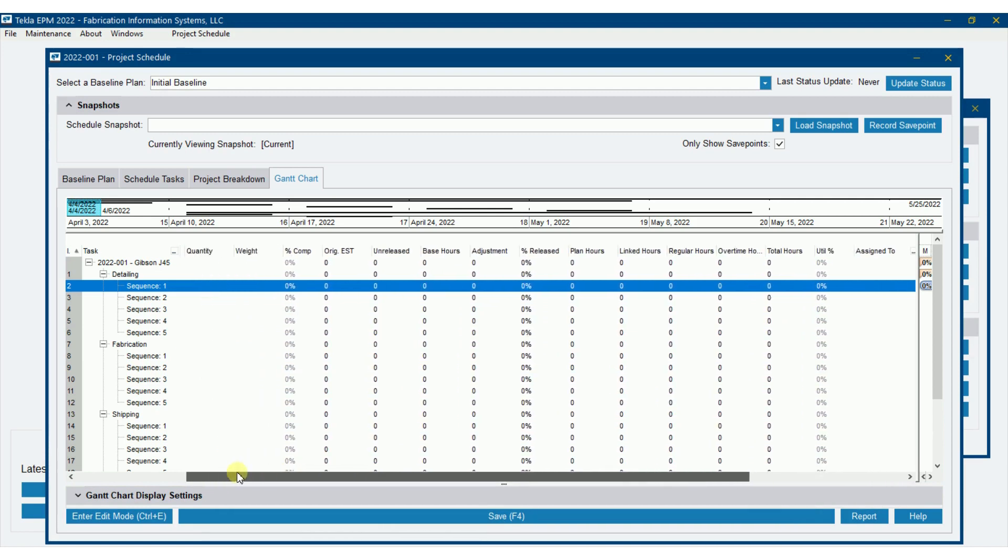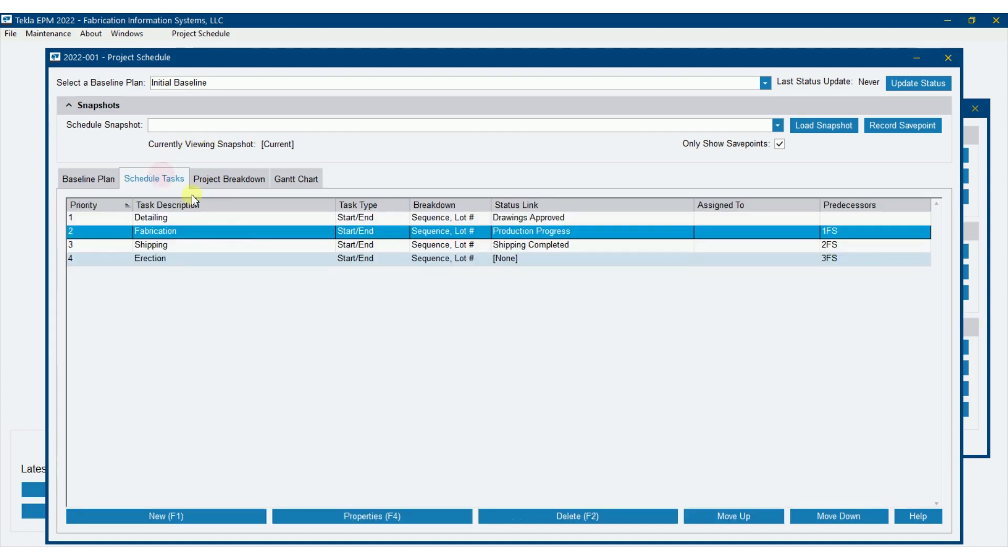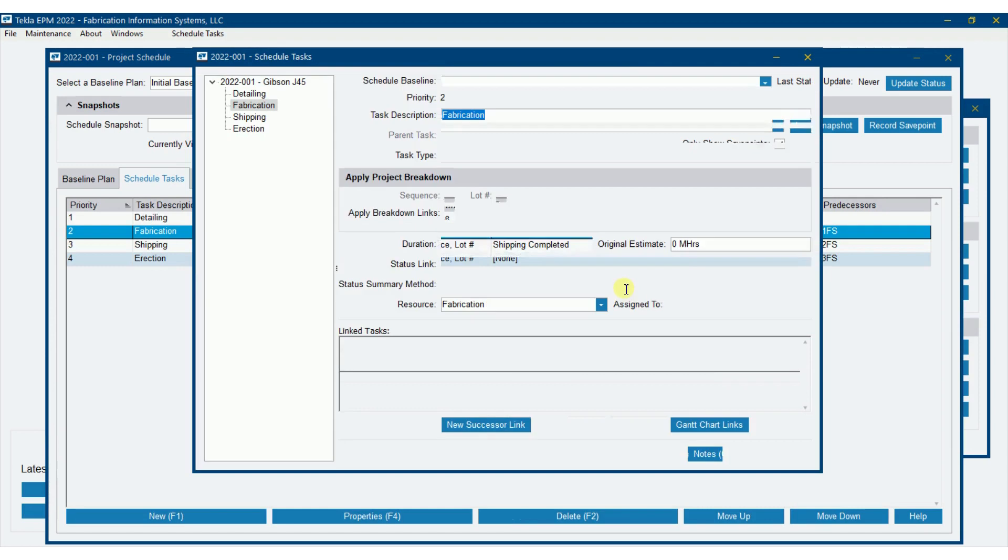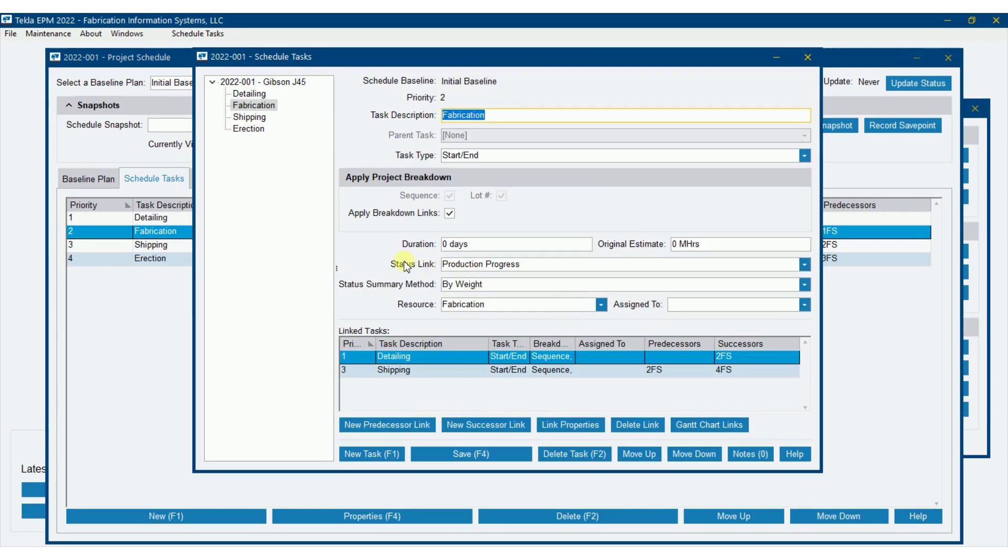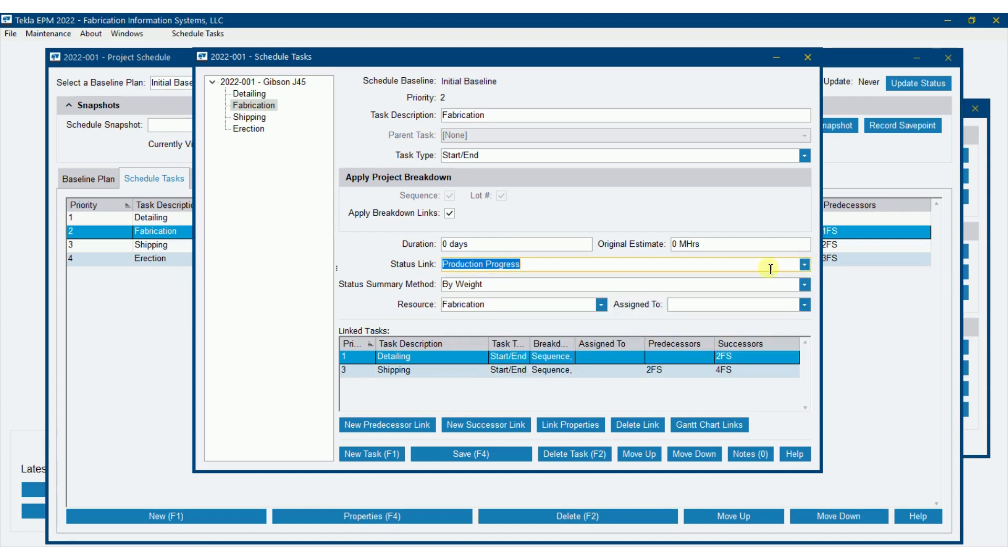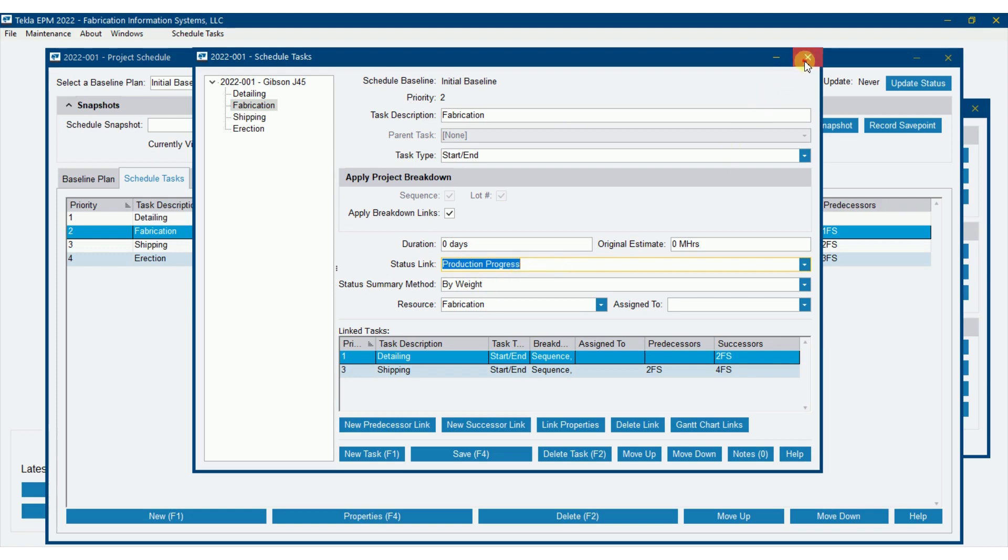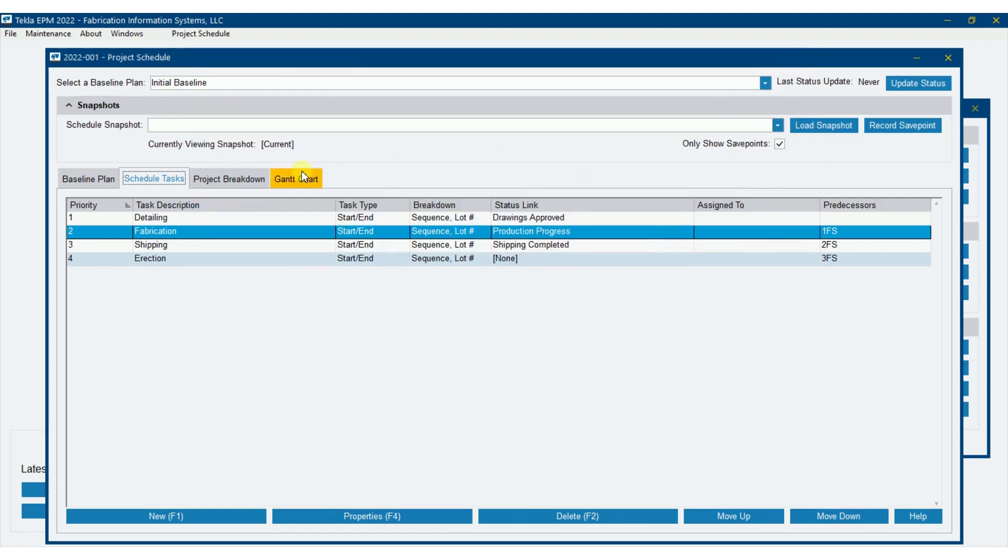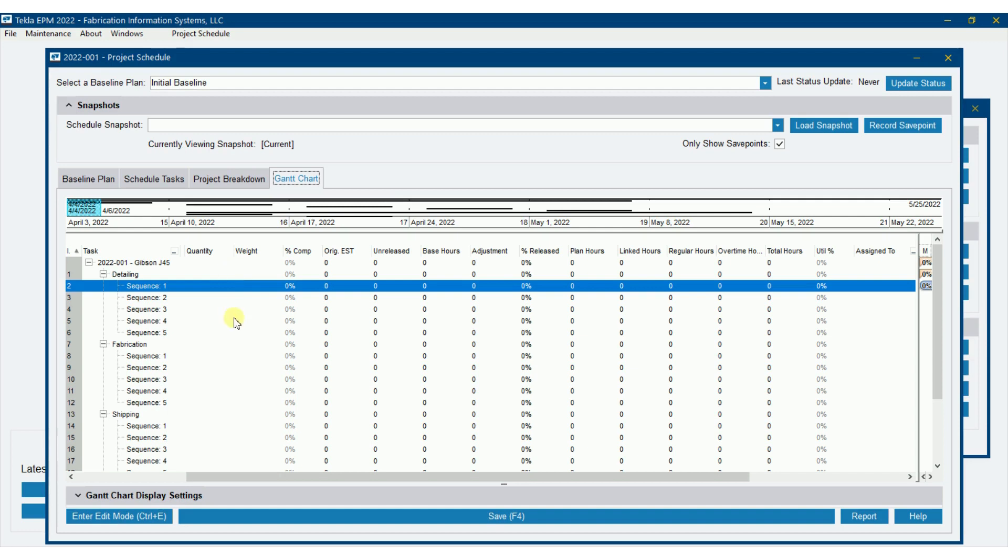Percent complete will automatically be populated as well. Now, let's go back and talk about that. If you remember on fabrication tasks, we had set it to calculate based off of production progress, or in other words, the number of stations that we've recorded that have been completed on each piece in the process. So based off of that production progress calculated by weight, then we should see here this percent completed for fabrication being the actual work that has been done in the shop.